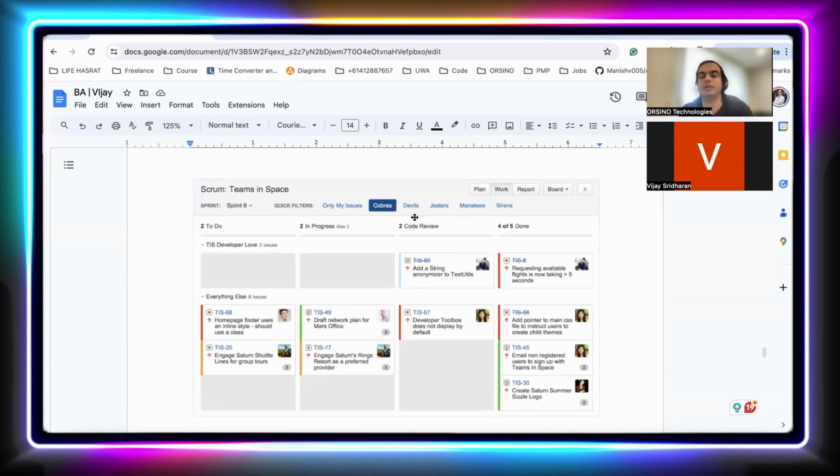Now similarly, just imagine this is the testing. So the moment it is in testing, it is the responsibility of the testing team. They need to see how many user stories are available under the testing phase, and they will check them one by one and try to update the status. Okay, sure. So if issues are found by the testing team, what happens then? Which status will they move it to? They will move it again to rework. Again, it will go back to the rework.